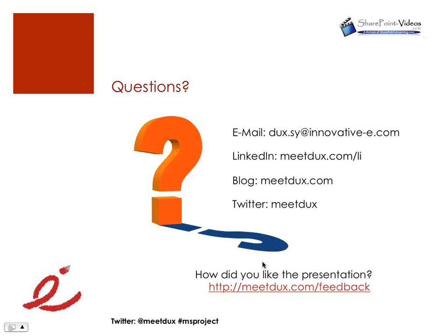The task synchronization capability is a feature new in Project 2010. And you can only do that with a SharePoint 2010 site. So if you had Project 2010 on your desktop and you have MOSS 2007 or WSS 3, the syncing won't work. It's just not there. Now, what version of SharePoint 2010 do you have to have for the syncing to work? You can use SharePoint Foundation or obviously SharePoint Server, Standard, or Enterprise.